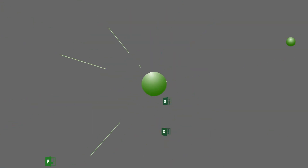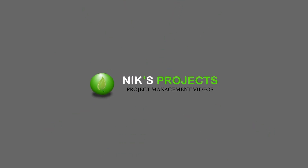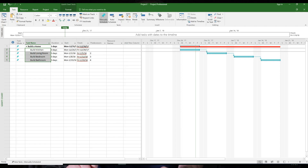Hi friends, in this video we are going to look at five keyboard shortcuts for MS Project that you're going to love. The shortcut I use most is Alt+Shift+Right for indent and Alt+Shift+Left for outdent.